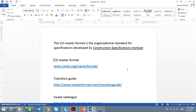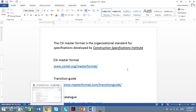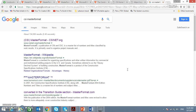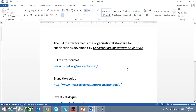The CSI MasterFormat is the organizational standard for specification developed by the Construction Specification Institute. It is widely used in North America, especially for commercial, institutional, and domestic buildings. You can go to their website — www.csinet.org/masterformat — and find CSI MasterFormat listed there.